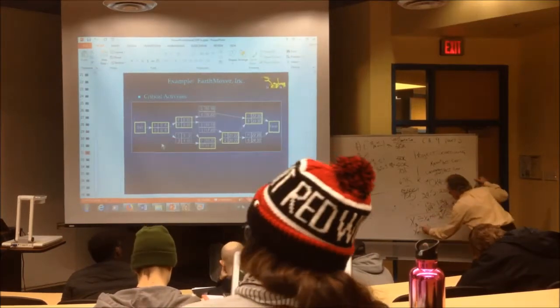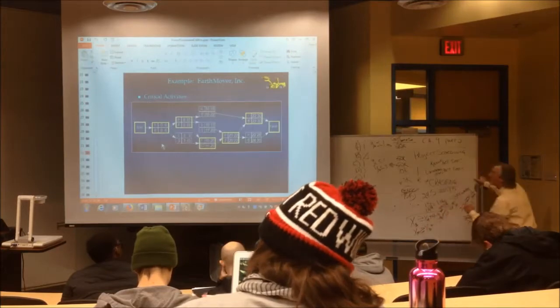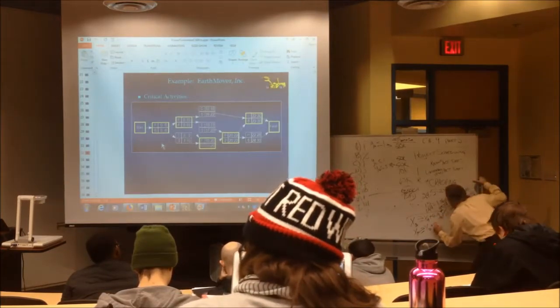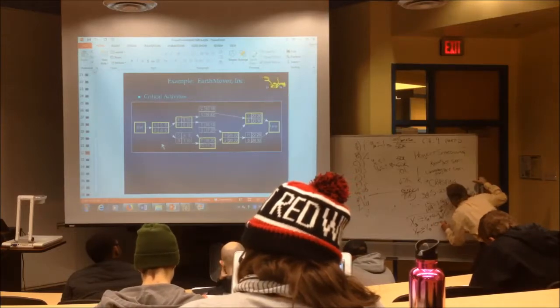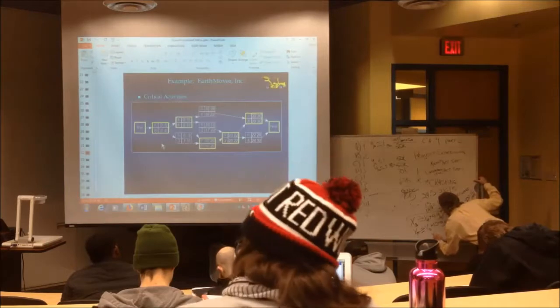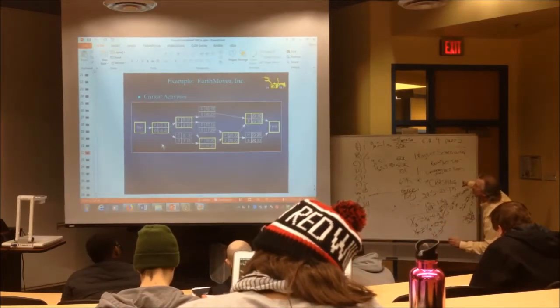Ready? X sub F greater than or equal to X sub B plus the normal time for F, you've got to find it, 10, minus Y sub F. And now I'm not done. I've got to write another one. X sub F greater than or equal to X sub, what's the other one?